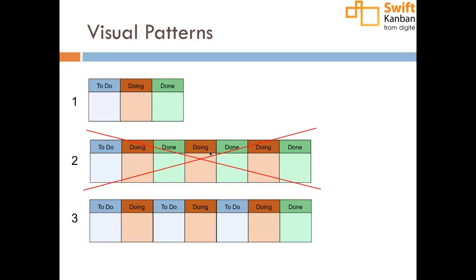Now it's psychologically nice to see done, but really what's important is for any given work to know what's waiting for the work rather than what has been completed. So in queuing theory, you will notice that the buffer is always before the queue. If you go to any store or Disneyland or whatever, people walk to where they want to get service. They don't wait when they finish getting service.